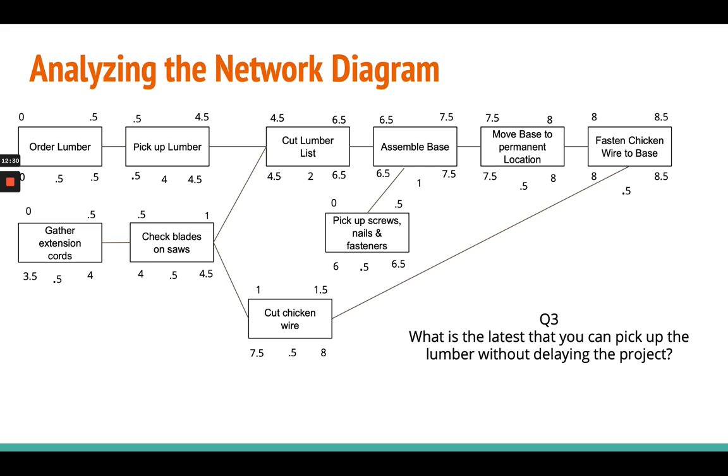And what is the latest that you can pick up the lumber without delaying the project? Well, picking up the lumber, as you know, is on the critical path. So pause here, think about it, and it is on day 4 by noon, halfway through the day.